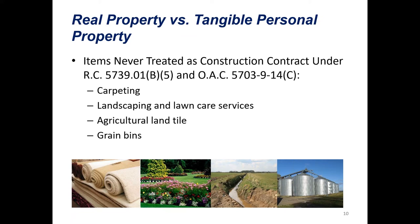Before we move on to case law, it's important to go over items that are never considered construction contracts under ORC 5739-01-B5, also found in Ohio Administrative Code 5703-914-C. These include carpeting, landscaping and lawn care services, agricultural land tile, and grain bins. Notice that there's no other type of flooring listed—laminate, vinyl, hardwood are all going to be considered incorporated into the real property under a construction contract, but carpeting is not. Carpeting is always going to be taxable to the contractee.